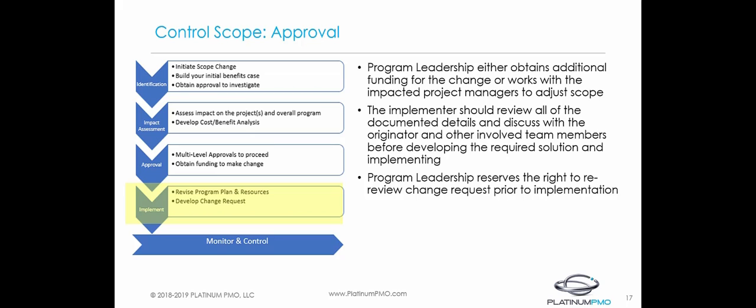You would then have to submit the change request to the change review board for final review and approval to release it to the next test environment. If you're already in production and this is an urgent change request to your production environment, you now need to be asking for approval to your quality environment and then hopefully to your production environment. As part of this stage, your change review board has final disposition on if, where, and when this change request